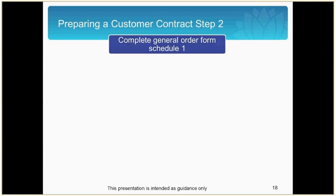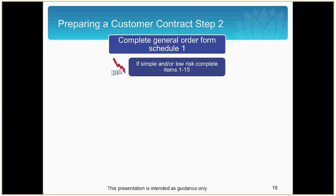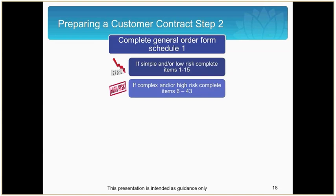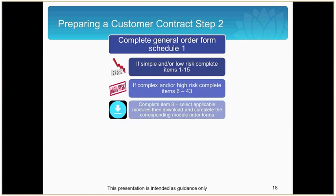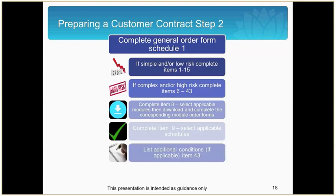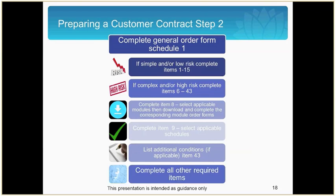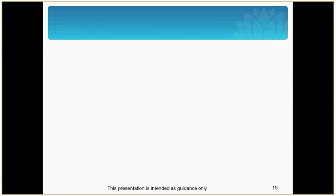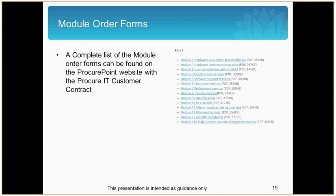The second step in preparing a customer contract is to complete the general order form, Schedule 1. If your contract is simple and low risk, complete items 1 to 15. If it's complex or high risk, complete items 6 to 43, remembering item 7 is for panels only. Complete item 8, which is to select applicable modules to download and complete the corresponding module order forms. Complete item 9, which requires you to select the applicable schedules. List additional conditions, if applicable, in item 43 and complete all other required items. Module order forms can be found on the ProcurePoint website on the same page as the long form contracts, as well as on the beta website.